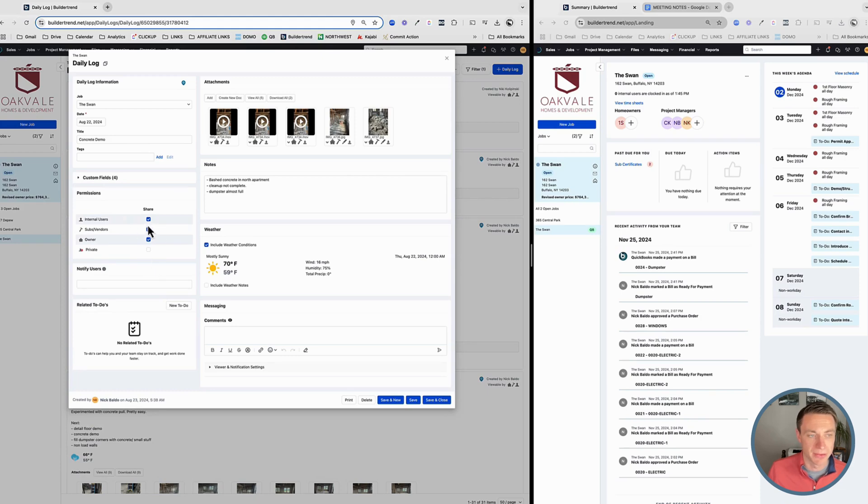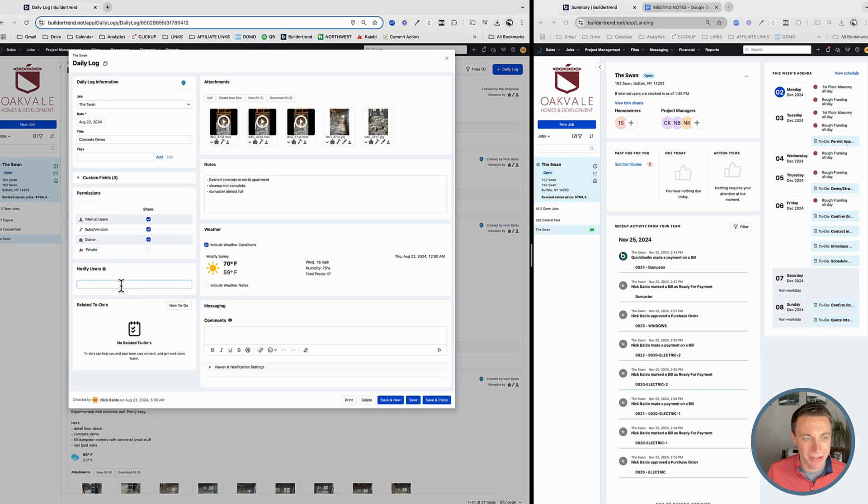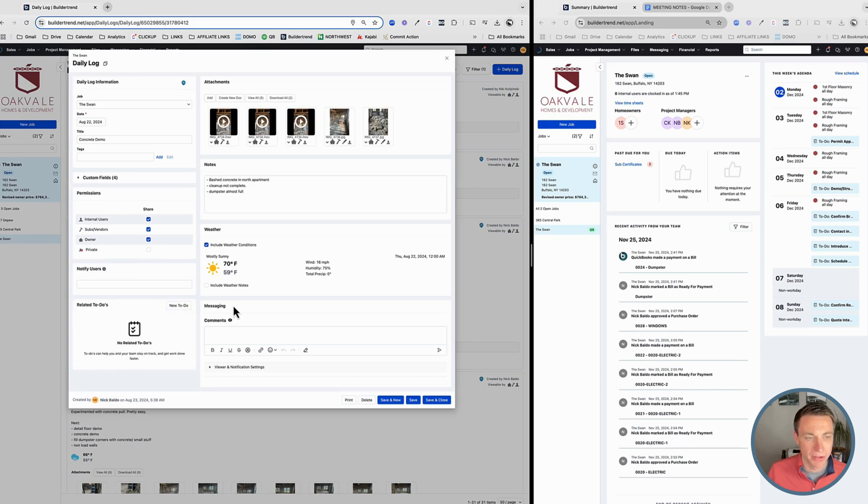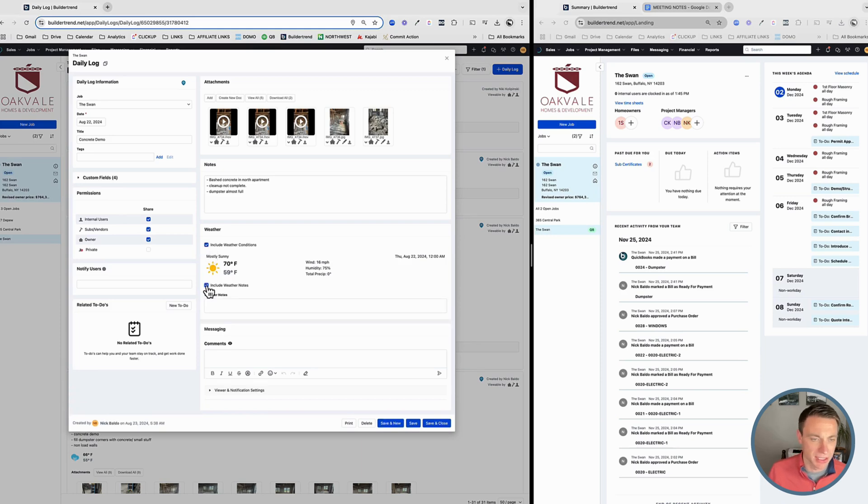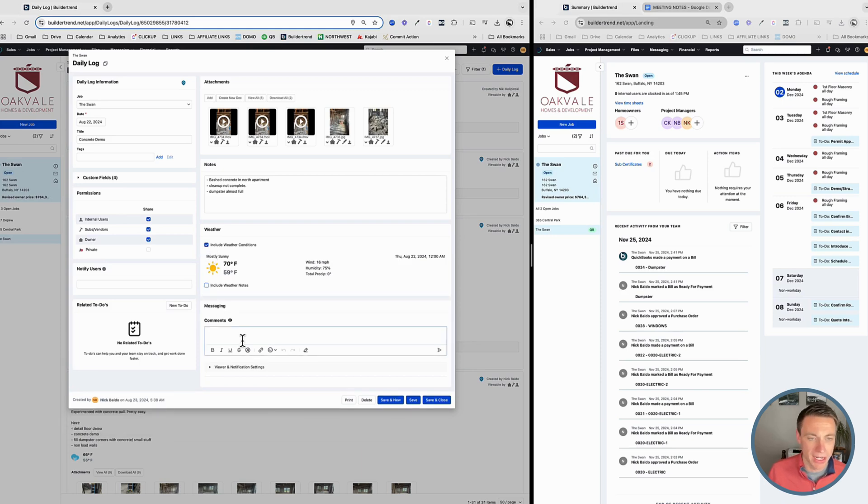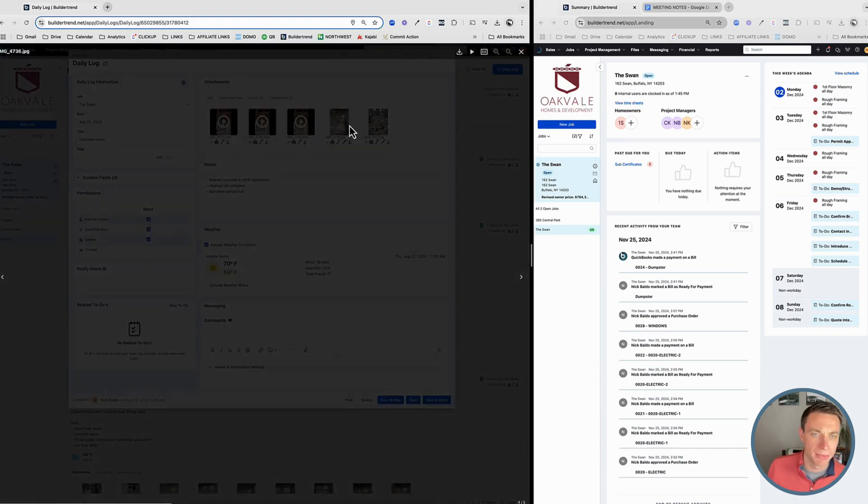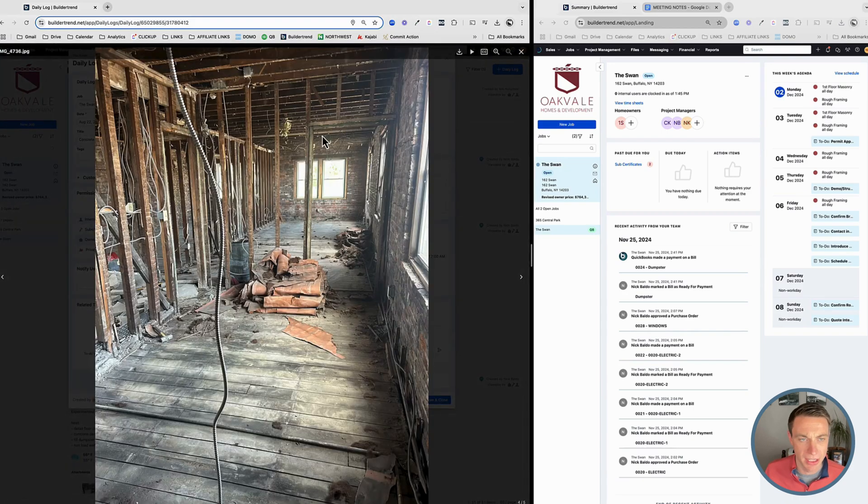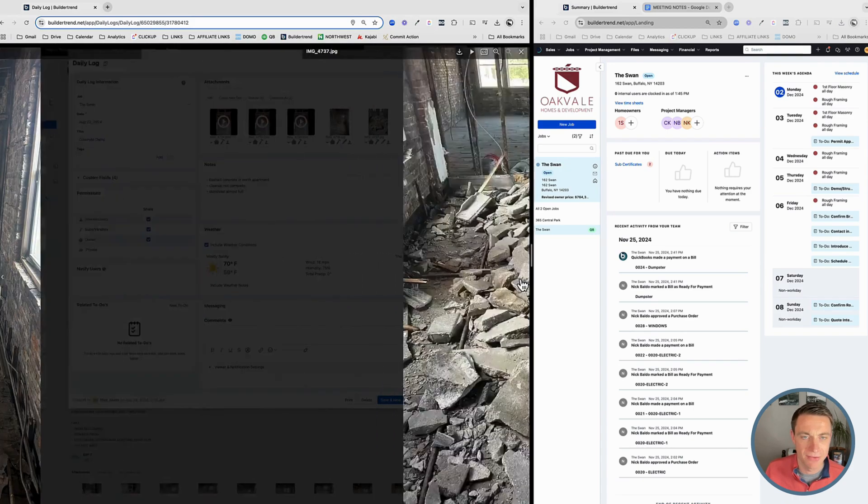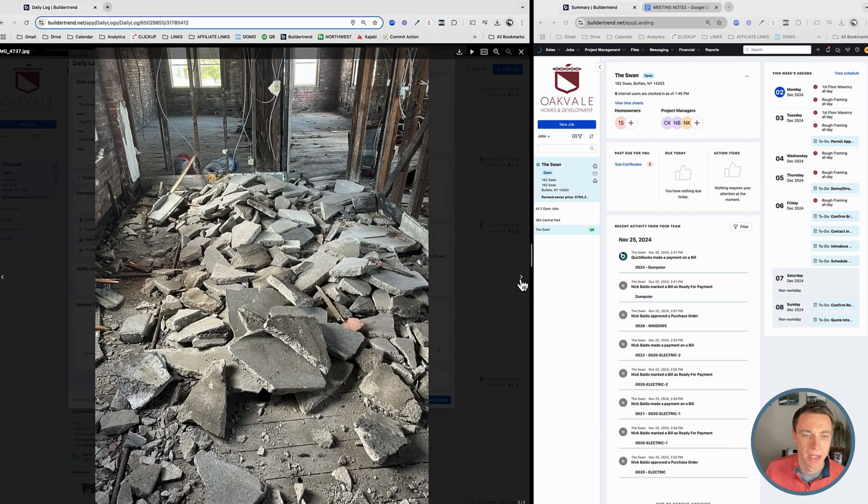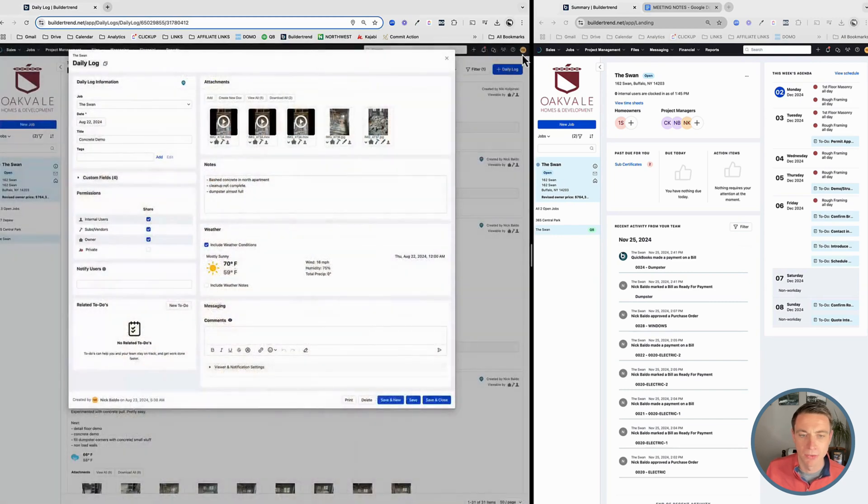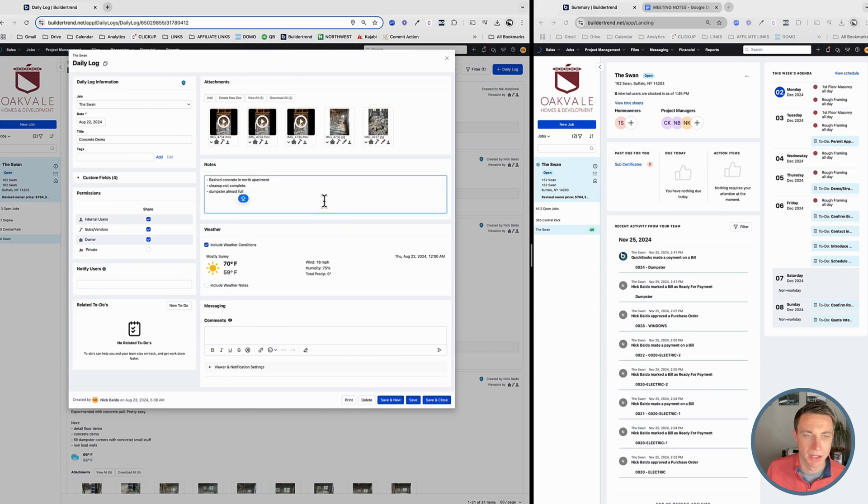We have some custom fields I'll reference in a bit. You have user permissions. Who can see this? Who can share it? This daily log and whether or not we want to notify users. I typically turn that off, including weather conditions. That's a default for me. Why not put that there? You could also add this to include weather notes. You can comment on it, communicate, and I also encourage that anytime we actually do work on a job and we issue a daily log, we should have pictures. Every single time, we should tell our crew that when they're done with their work and they issue the daily log, include pictures so that we can reference it.